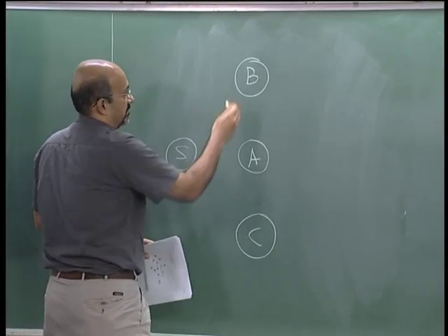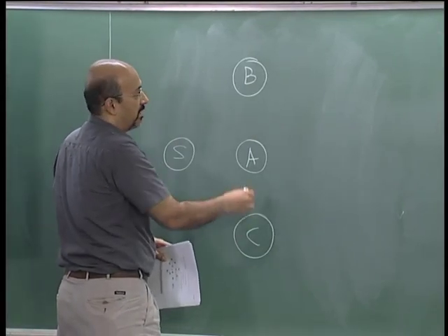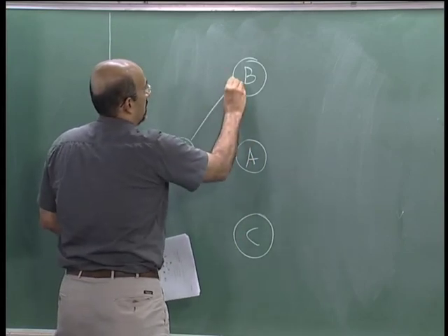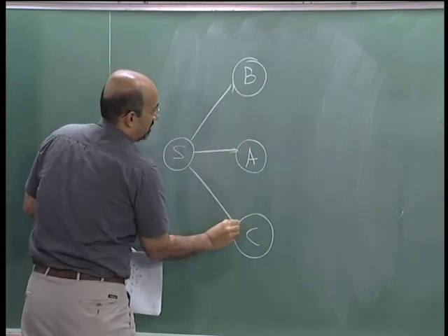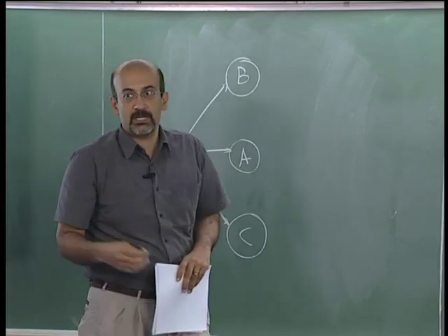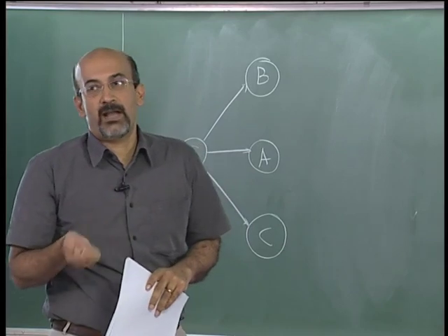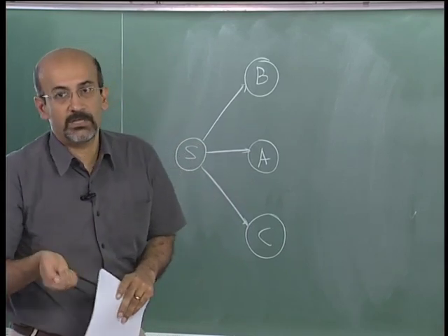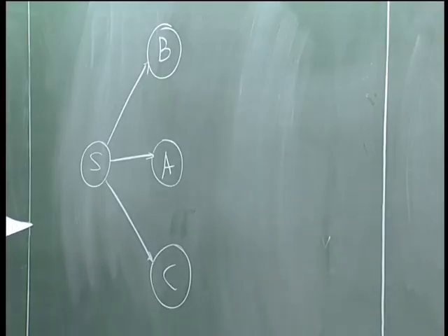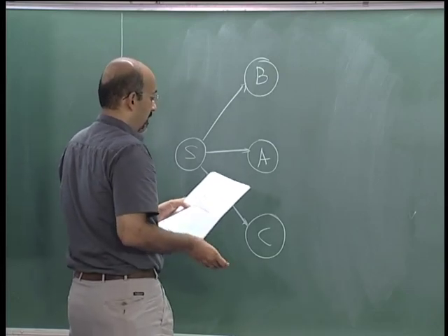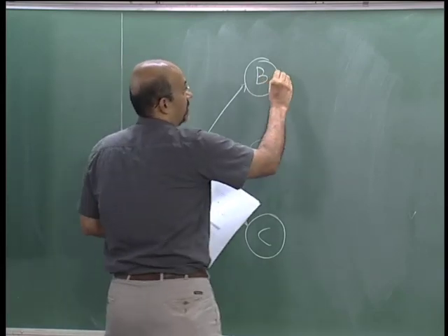It is always good to put a start, which might be a 0 duration activity, the kind of dummy which you will have in AON. Remember, AOA had other kinds of dummy requirements for dummy activities. This is the only kind of dummy activity you will have for AON, and from B you will have D